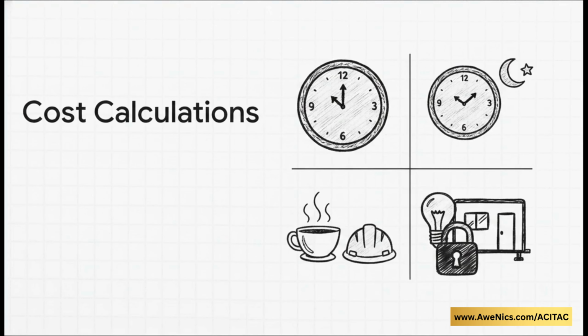Okay, we've got our inventory and our daily limits set. Now we need to talk about price tags. So the crucial point here is how cleanly the software separates total costs. You've got your direct costs, the standard rate for normal working hours, and the overtime rate if you schedule them for extra hours. But then it brilliantly allows for micro-level indirect costs.